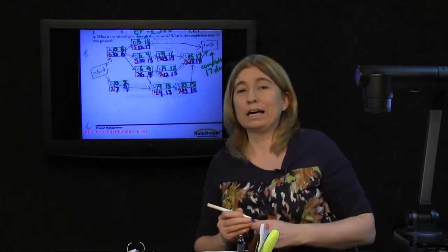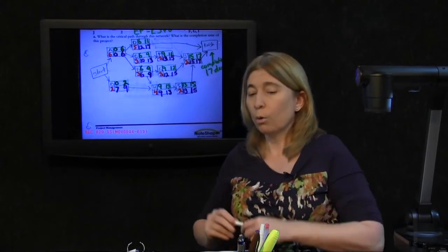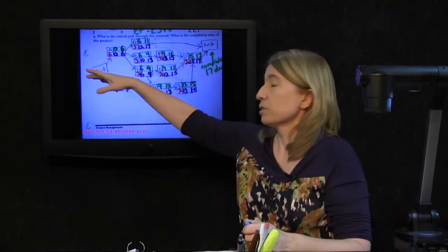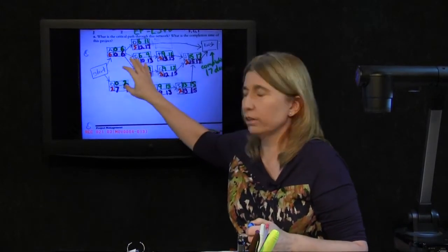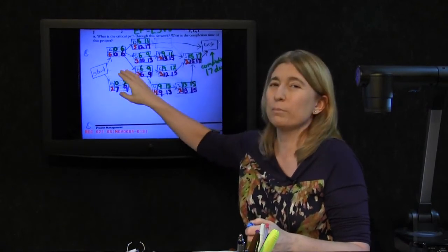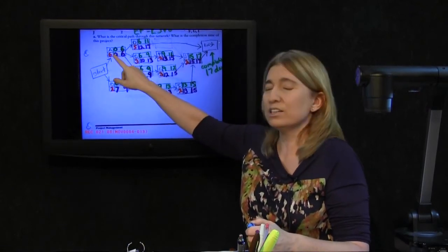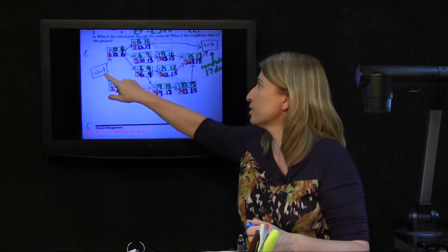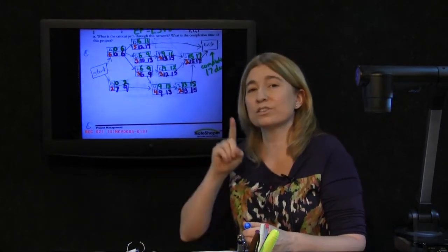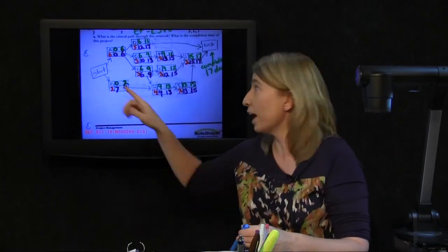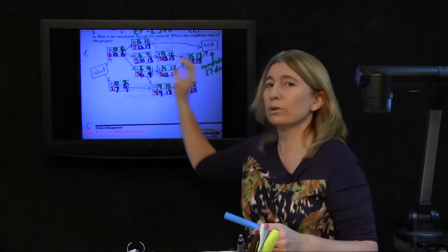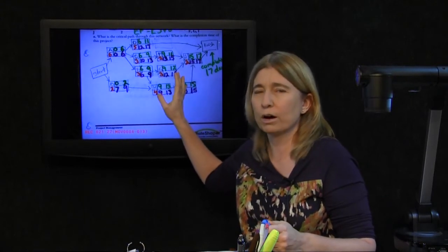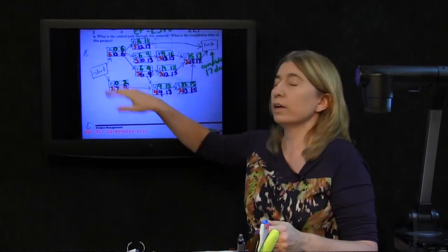And I'm really glad to see that 0. Why? Because once I find my early start, early finish times, and then I turn around and find the late start, late finish times, by the time I work my way back to the starting node, for at least one activity attached to the starting node, the late start time needs to be 0. It needs to naturally result in 0, like A just did. If that doesn't happen, it means that I have messed something up along the way and I need to go back and find out where I made a mistake. But, good, A zeroed out.